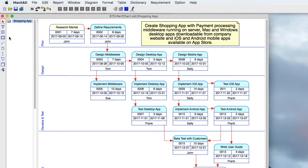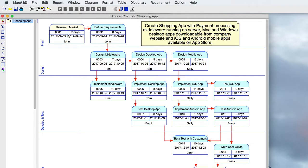you're mostly adding nodes with the palette tools, and those nodes indicate different tasks and the information about those tasks, and then connecting with directional lines showing the dependencies.